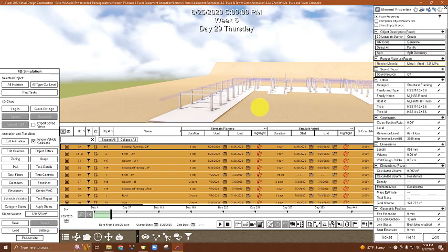The next step is creating a staging task to hold these items before they go into our animation. A staging task is a good way to show where the items will be placed when they are waiting to be installed on the site. Once the staging task ends, the items will return to their place in the model. Because our truck will be carrying in our beams, it doesn't matter where our pin goes, since they won't actually be sitting in the staging area.